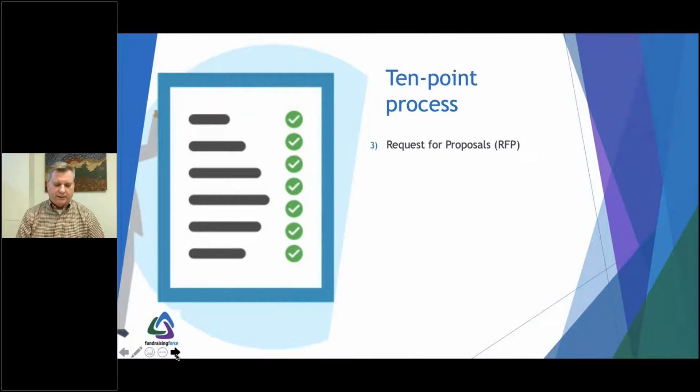So the RFP, you actually need to write up a document. They sometimes are 20, 30 pages in length because you need to tell a story about your organization, walk them through the process that you're following to ultimately select a CRM, and then you want to identify some questions that you need them to write narrative answers back on. So what are those things that you must know?